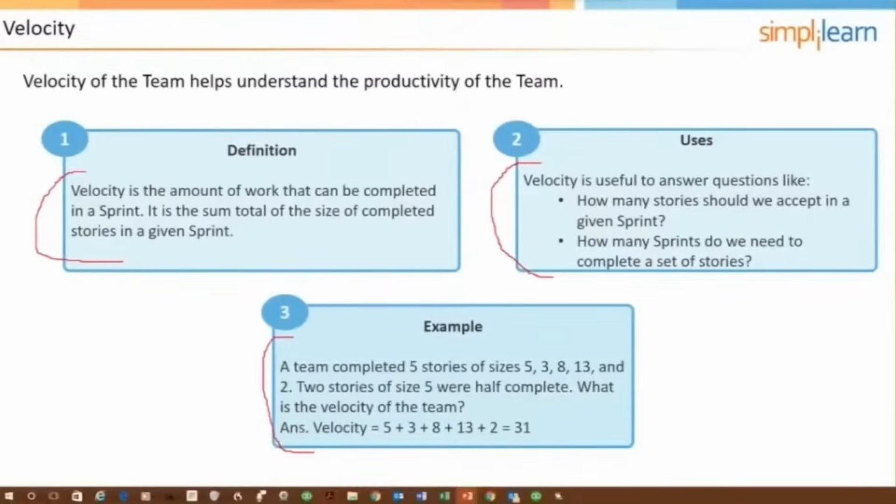But it's not going to be 36, because the only thing that counts towards progress is working software. So even if the team had finished 9 out of 10 story points for a user story, meaning it's almost done, and then the sprint ends, that doesn't get counted towards velocity. And you don't mess around with velocity. You can mess around with your estimating, and you can mess around with what user stories are going to be completed in a sprint, but you don't mess with velocity. The velocity is not variable. It is what it is based on past performance.